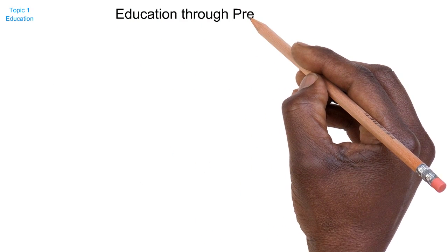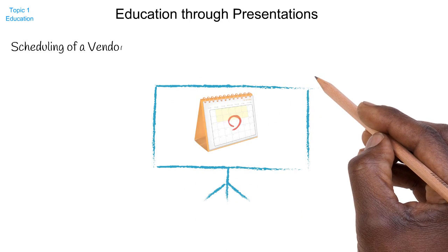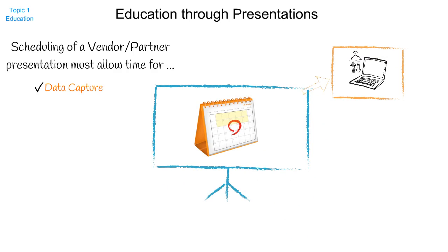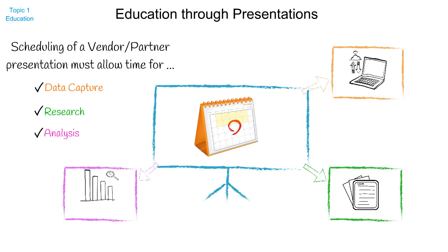After a vendor or partner responds, consideration must be given to schedule the meeting far enough in advance to allow the data quality team analysts time to gather the data and known issues for research and analysis. Once the observations have been recorded, then the team must prepare the deliverables, including a clinical review workbook and presentation. The lead time consists of a minimum of 2 weeks.